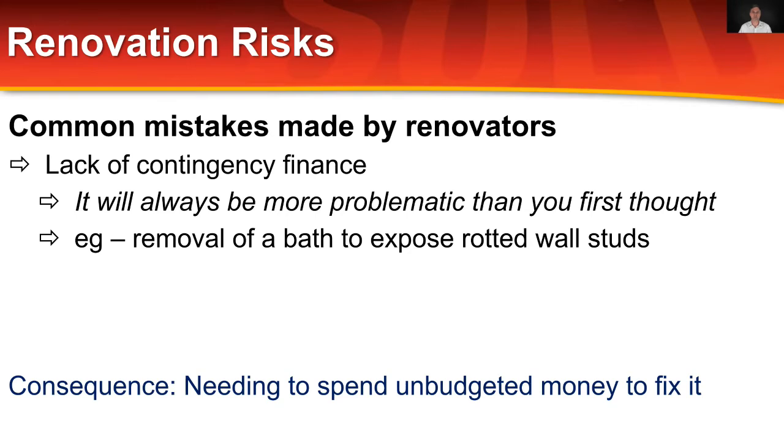The consequence of that was that the stud wall that held the bath, the studs themselves were rotted out at the base of the wall where the floor is. And having removed the plaster, my wall was able to swing in the wind. It would just swing backwards and forwards. There was nothing supporting the load-bearing wall because the studs had rotted out. The consequence was a structural requirement to rebuild that stud wall.